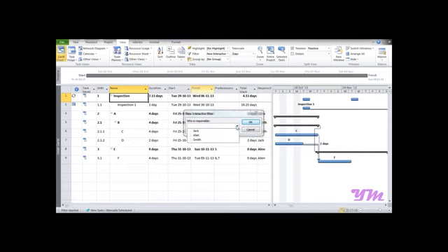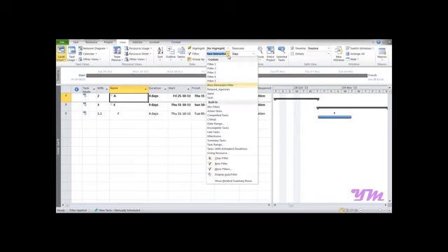Who is responsible? We can select Alan, press OK. Now enter the value of Slack. If you want to see a critical activity, we can place 0, or any other value as we want to see. Now let's put 0 and press OK. So now we can see the activities which belong to Alan and having a total Slack equals to 0. So this is how the interactive filter works, and based on the requirement we can create a multiple level filter.